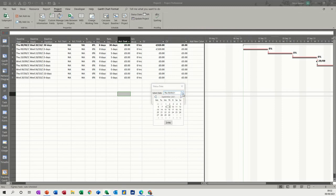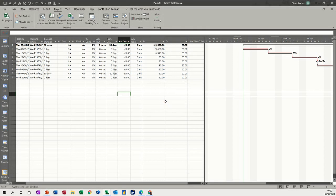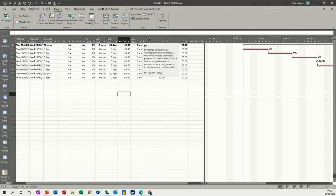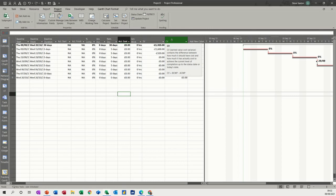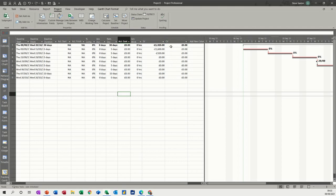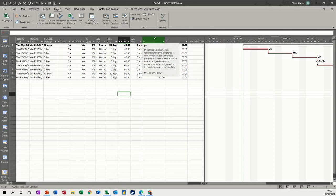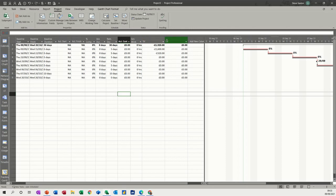If I hover over schedule variance, it tells you what it basically is - shows the difference in cost terms between the current progress and the baseline plan. Cost variance shows you the difference between how much it should have cost and how much it's actually cost to achieve this current level of completion. The formula is budget cost work performed minus actual cost work performed for CV, and budget cost work performed minus budget cost work scheduled for SV. These are tools that you can use to check whether you're doing good or not doing good.